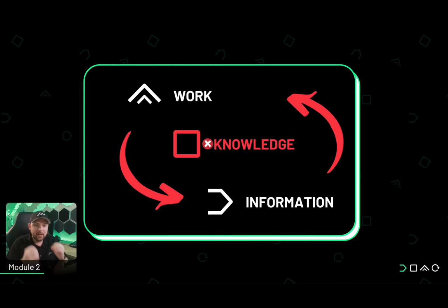All this collecting of information, you could have this in a knowledge base where you have experiences from certain vendors, that the quotes are around this and it takes that long until you get the quote. This is information that you could collect as lessons learned and that you can leverage in the next project to become better in the next project when you're going through.